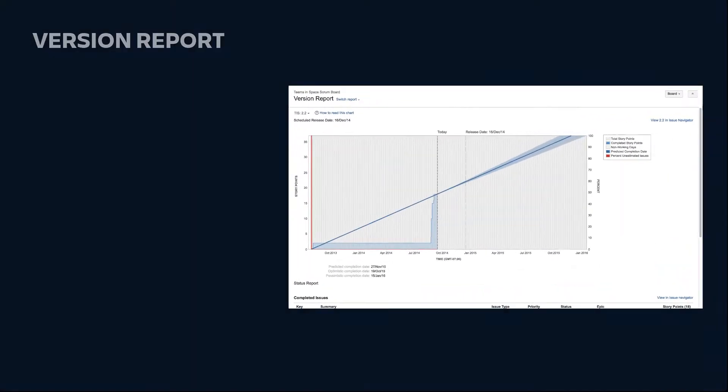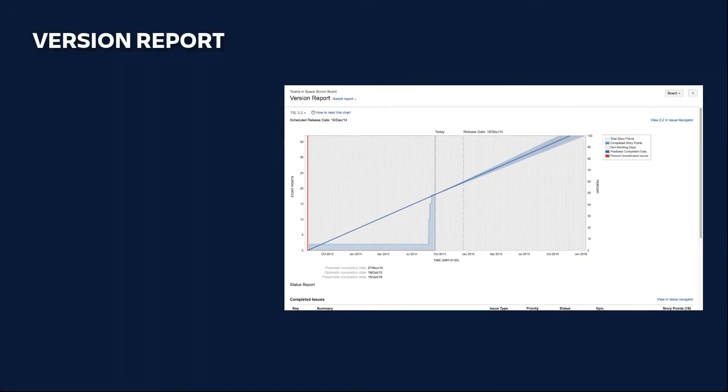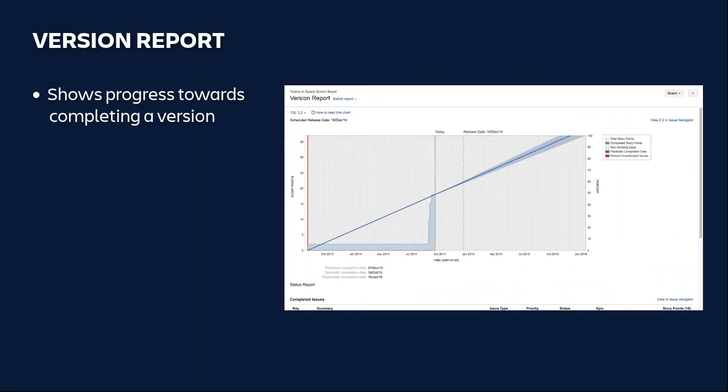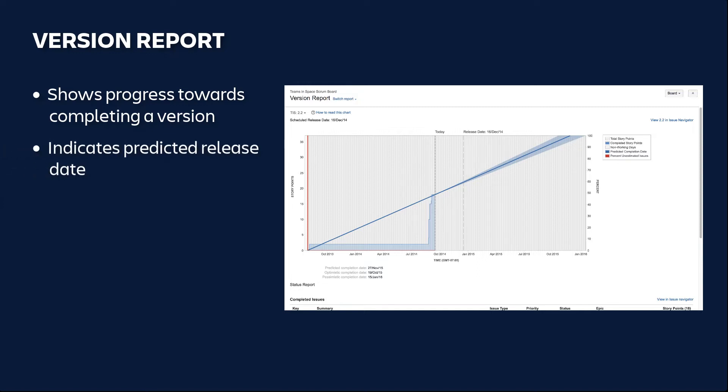The version report shows your team's progress towards the completion of a version. It also indicates the predicted release date based on your team's average rate of progress or velocity since the start of the version and the estimated amount of work remaining.